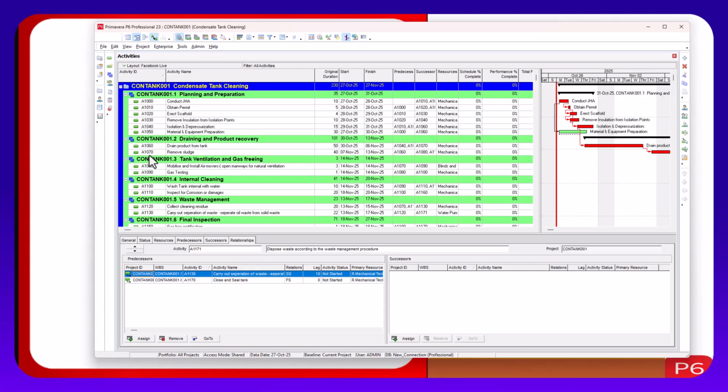Then name calendars clearly. Those are best practices. When you have your calendar, like I named this one now, this is a project calendar and I named it TAN 001. So it's very specific, so that people don't make mistakes. And also when you are naming, using your naming convention, name it by what type of calendar it is. Remember the one we said is a 6-day work week.